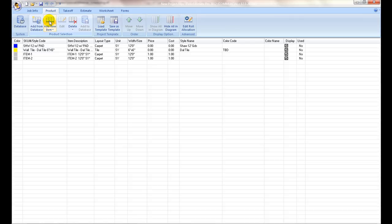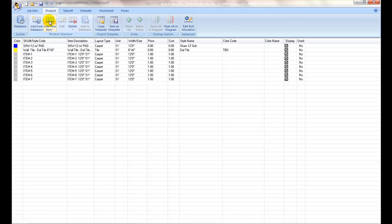Setting individual item properties: Click on the Add Item button to add as many items as needed. It may include main covering products such as carpet, VCT, as well as any add-on items such as base, heat rod, etc. The next step is to configure the estimating properties of these individual items.